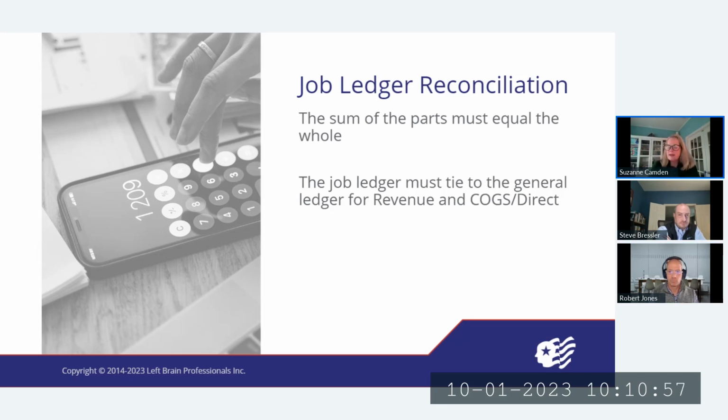I was just going to say, to what you're saying, that you're only as good as your setup. So many times when these don't tie out, we've gone back and whatever the jobs are that have caused problems typically are the ones still causing problems. They have bad setups, or they got started and then they got canceled, or costs didn't get backed off of them. Generally, the costs end up hanging out there.